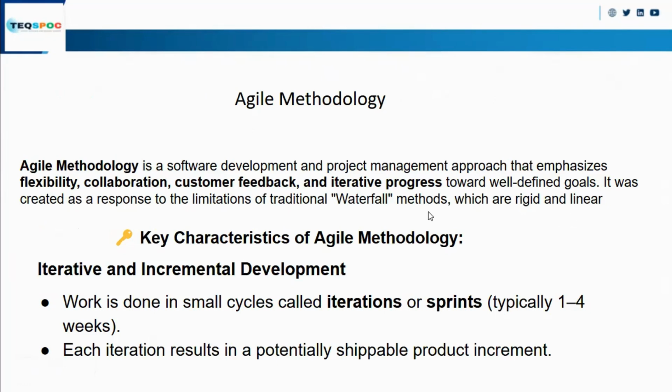So basically, in the waterfall model, what happened? In software development, if some client comes and says you have to create an e-commerce website, the first thing that will be done is data gathering. After data gathering, we will do the design of the software, your software architecture. Then the development will take place, and then testing, then release, deployment, and maintenance.